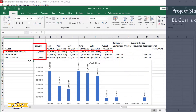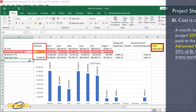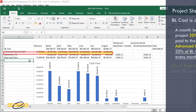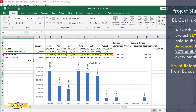20% of total cost is paid as Advanced Payment. But every month, this 20% is deducted from the baseline cost. Also, 5% retention is deducted from the baseline cost every month.